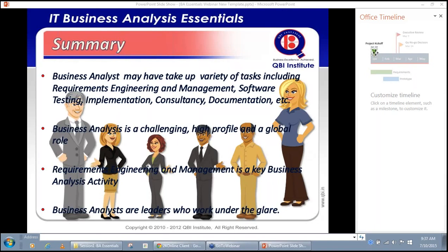First, even if you are located at a distance from the client, you need to identify someone who is a project champion, someone who can be active on your behalf at the client side. Many times he will help you with quick interviews with the important stakeholders, or follow-ups with them. So if you can identify a project champion, that will help.